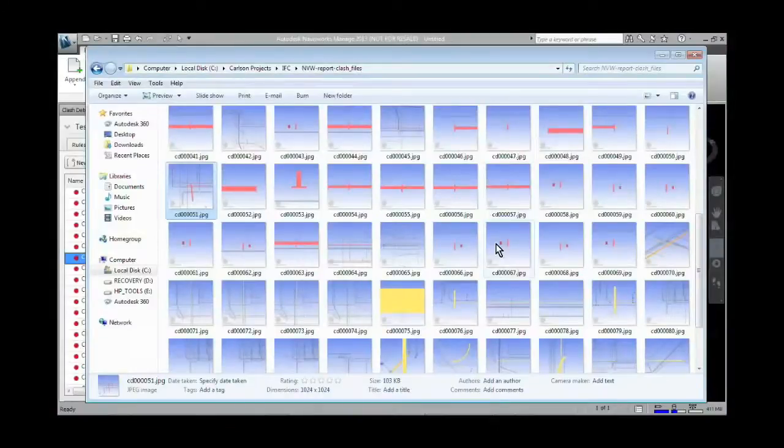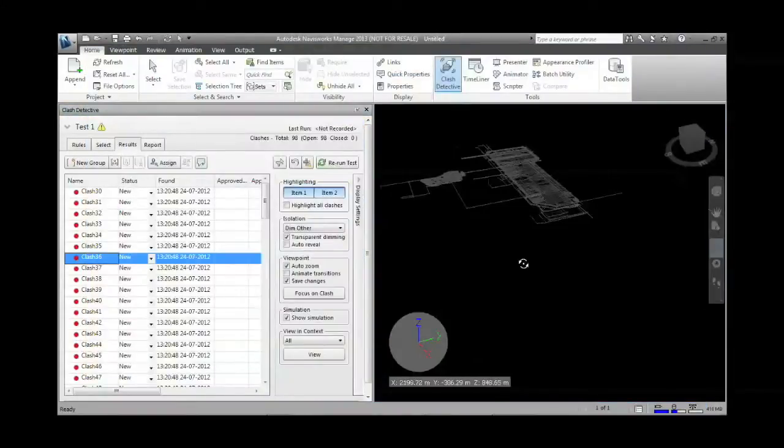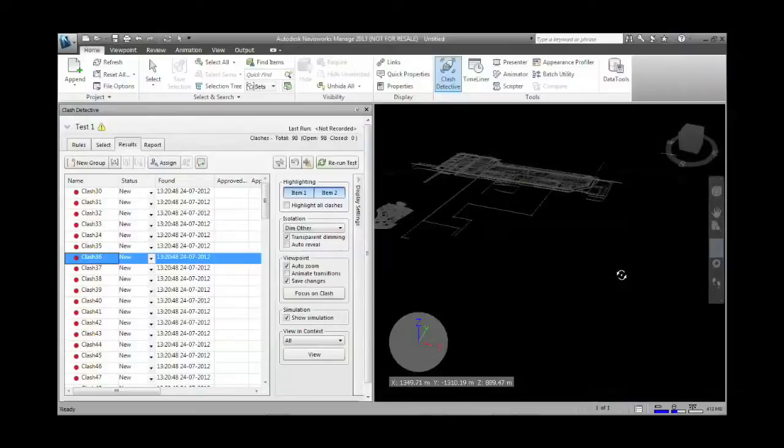And you can also go by classification. So you could just look at water lines, or you could just look at water and sanitary and electric all passing through a conduit. So this is what the BIM is allowing us to do now. And you can kind of see here that I have the entire facility, including our new design of the building from Revit and the surface from CARLSON software. I would then go ahead and inspect my clashes, rectify them, run it until it has no more clashes, and if that's the case, I would then go to construction. So very, very simply and in a nutshell, that's what the BIM is for.